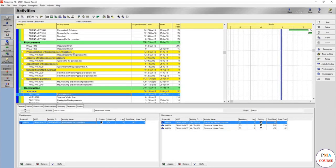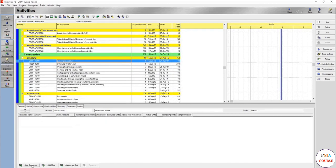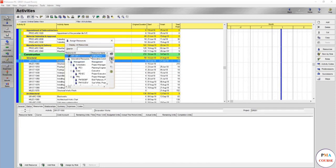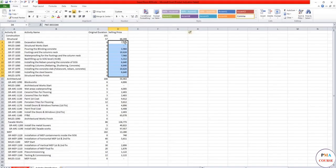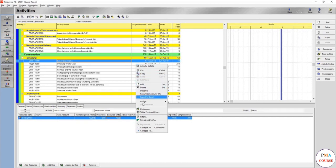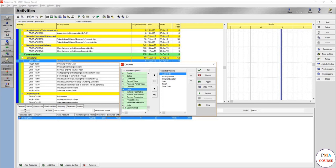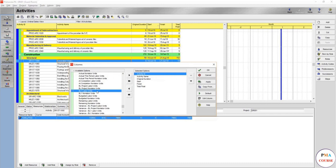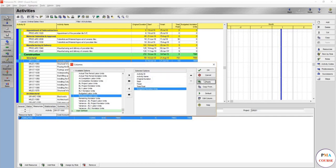Let's go back to our main activities. We need to assign resources for this activity. We would go to the resources tab and add resource. We're going to add this one and done. In this case, if we make this 48, it's automatically 48. We needed 7,968 exactly. I want to show you this because whenever you're going to show the column of units, you need to show the budgeted non-labor units. Here it is, it's 7,968.